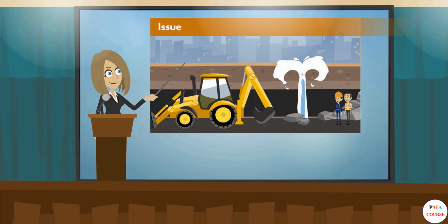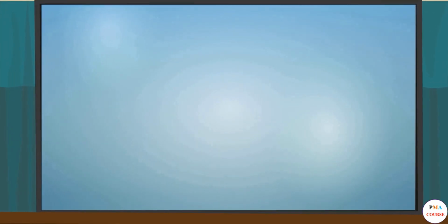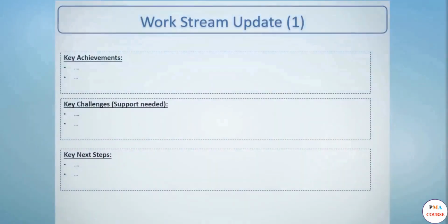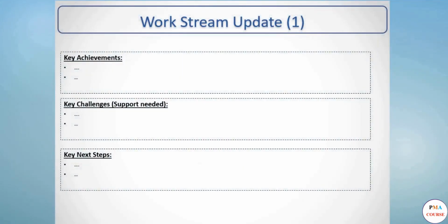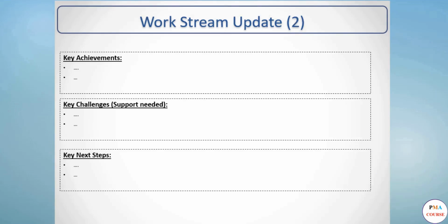Once a high-level status has been determined, the meeting can head into individual work streams for detailed updates. Let's look at the work streams for our Lamborghini project. For each stream, you or the stream owner can present updates and any challenges or risks, and you will present the schedules and actual data recorded so far. When reviewing each stream, you must be able to compare the situation to project constraints.